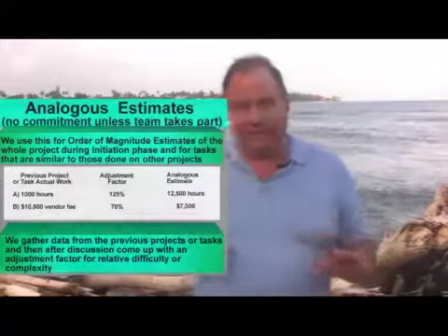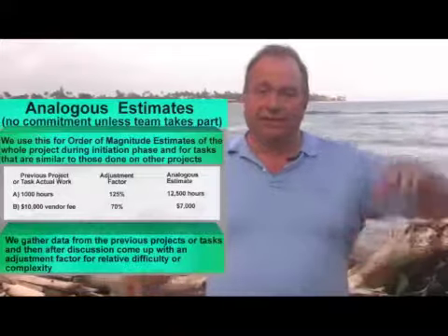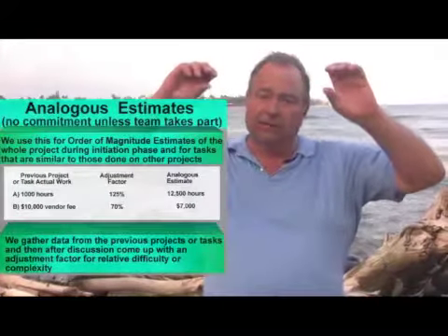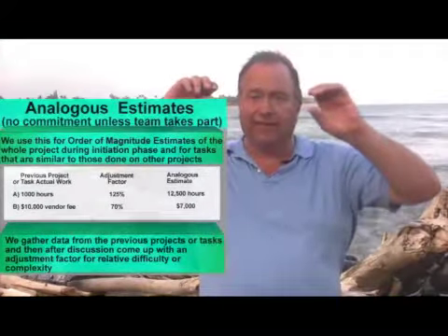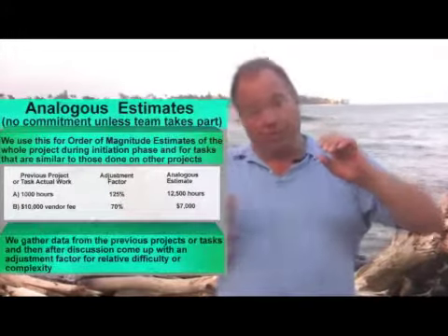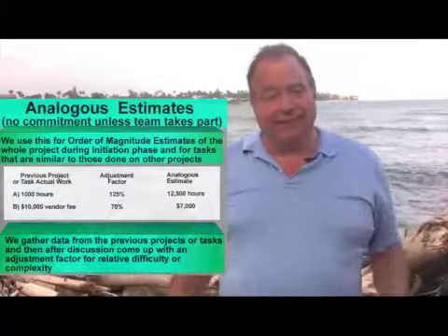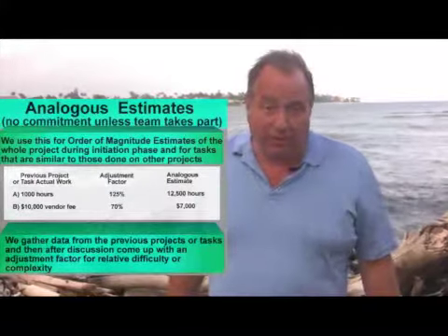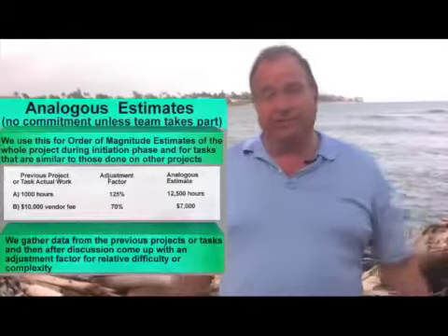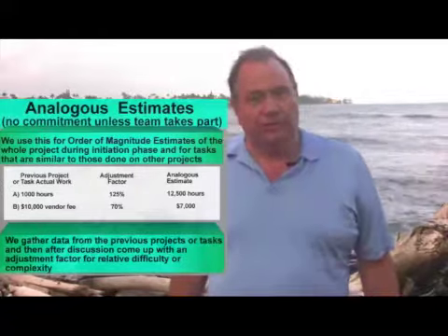As you'll do in the assignment, we can do this for each of the major phases of a project. Find a similar scope for that phase, do an analogous estimate, do the multiplication. Could be more, could be less work than the previous project, and that's how we build the analogous estimate of the project as a whole. And you may even use this on individual tasks when you can't find something that is real close to this task that you've done previously.